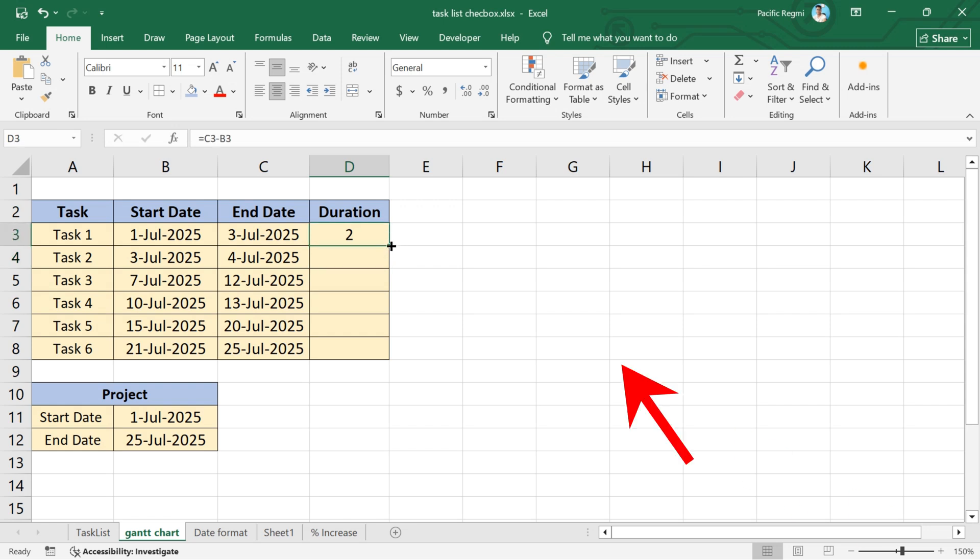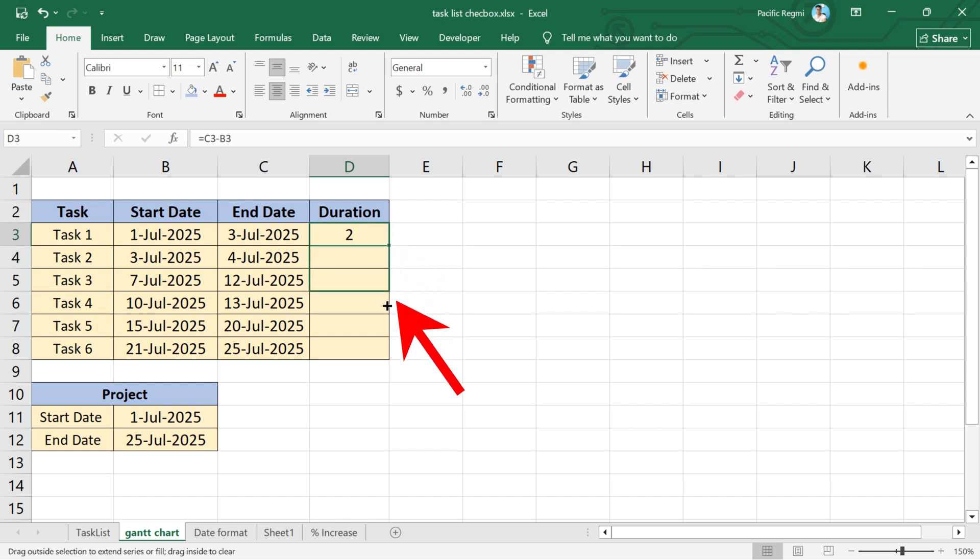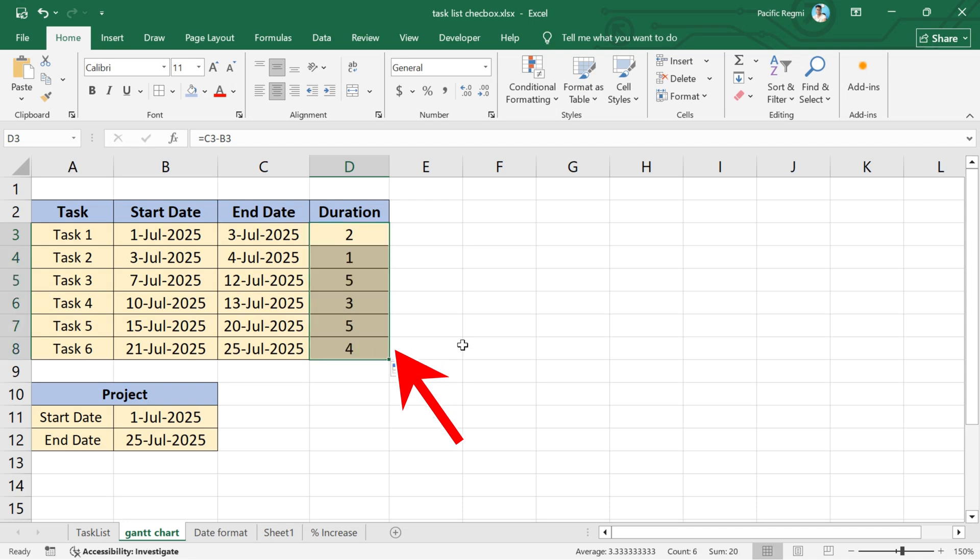Excel will show the duration in days for task 1. Next, drag the fill handle down from this cell to apply the same formula to the rest of the tasks. This will calculate the duration for all tasks in the list.